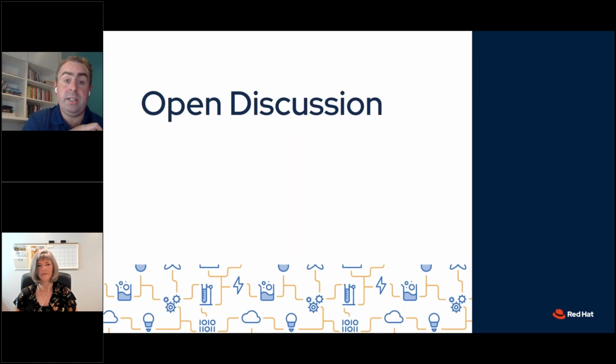Another really useful practice is called the definition of done. So when we are done with an item, a feature or a piece of development, what are all of the things that we will have done? Having people from operations and people from development involved in co-writing the definition of done can really get us onto the same page.